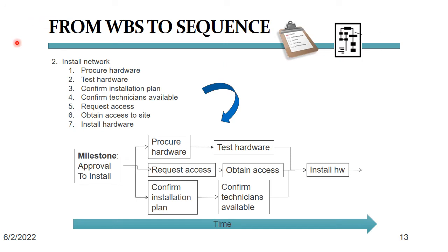Once the WBS document is done, and remember, in a waterfall cycle, we don't go back and refine very often. We assume that everything is right once it is approved. We can now determine how the tasks in our list are connected. Does each one have to follow the other in sequence? Or can some of them run as parallel work streams?